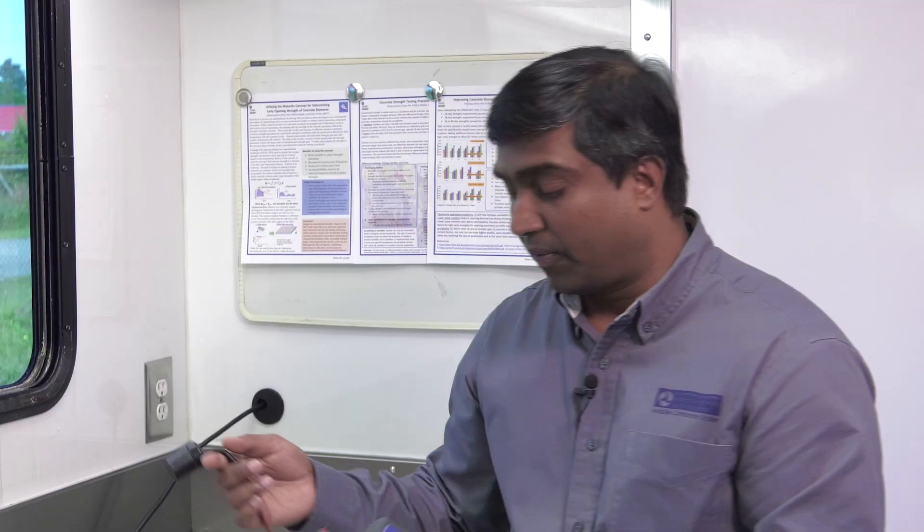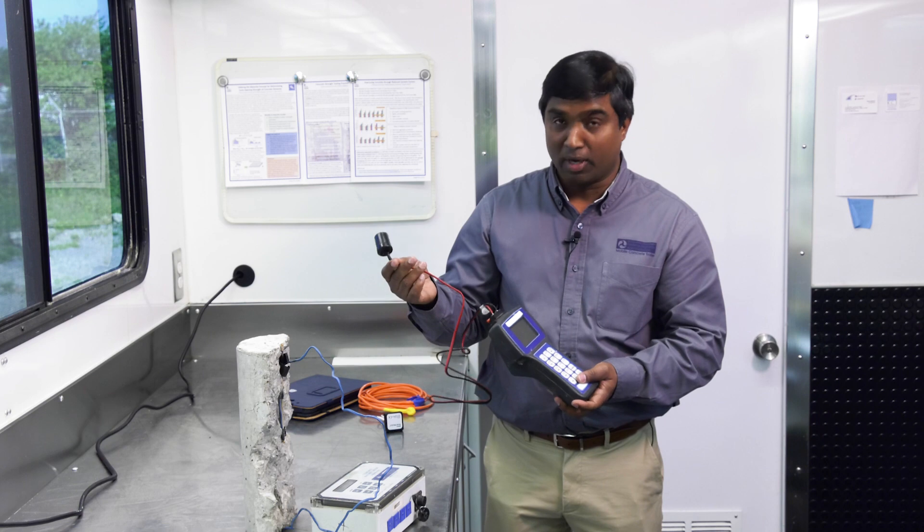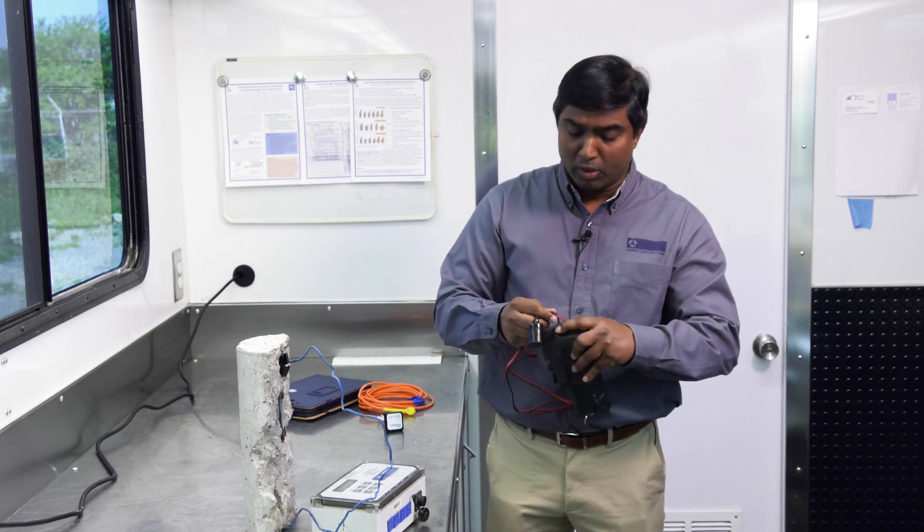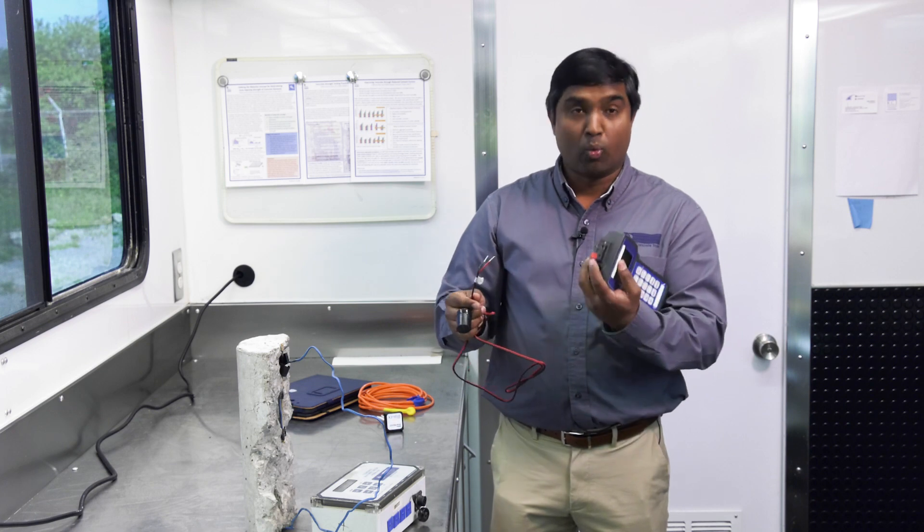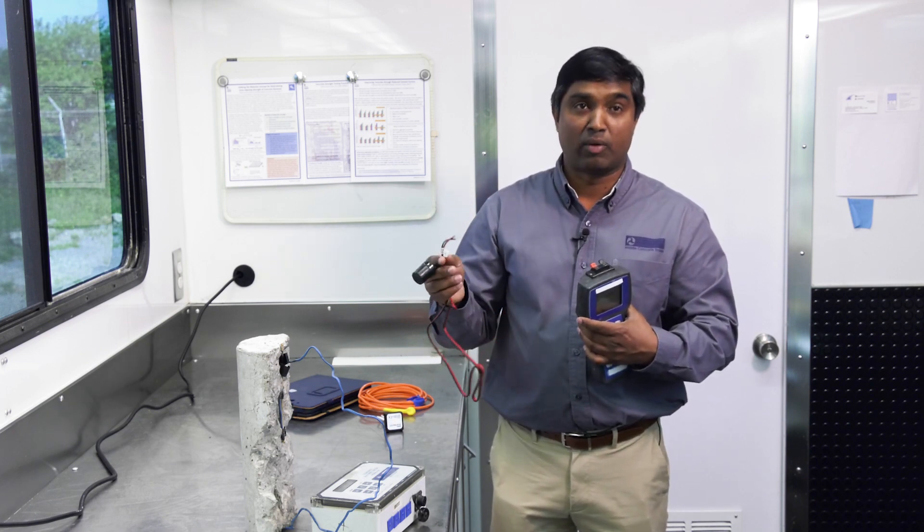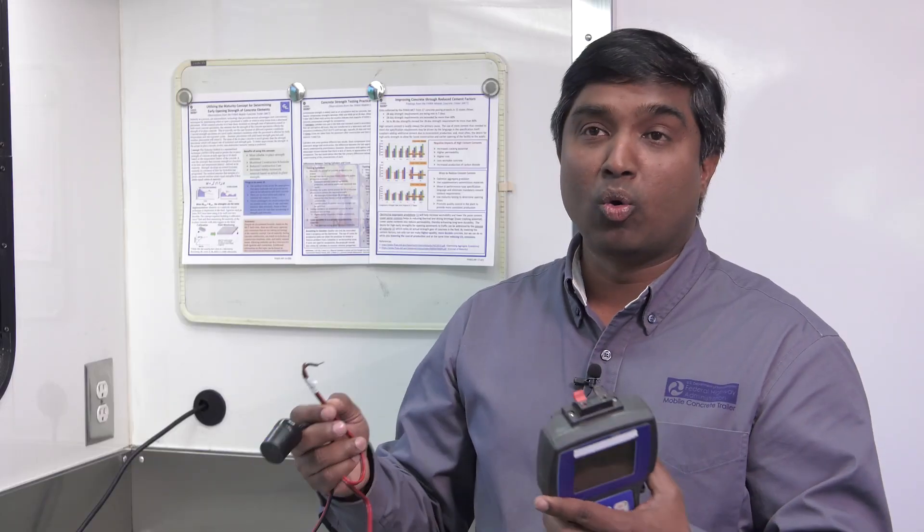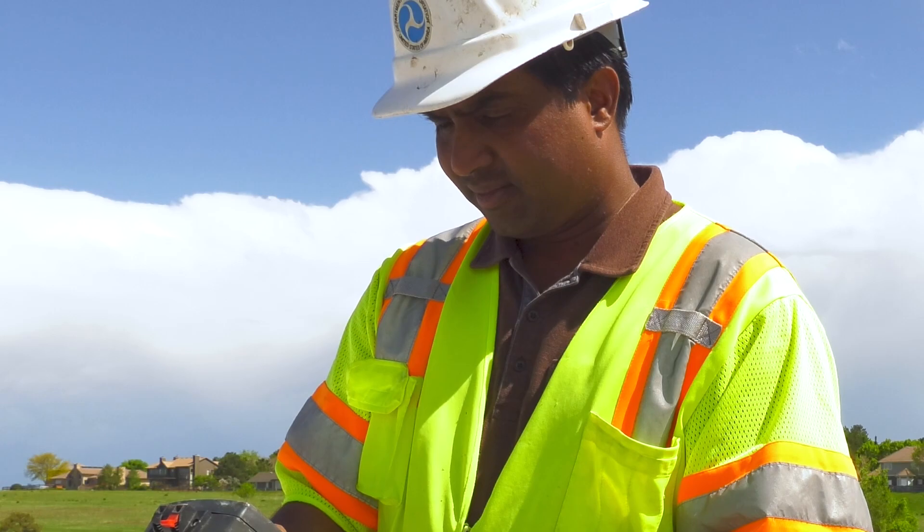The other technology that we have to measure maturity is this one. We instrument this in the field and use the data logger to activate the sensor. Once we do that, we can go at any given time and measure the in-place maturity using the sensor.